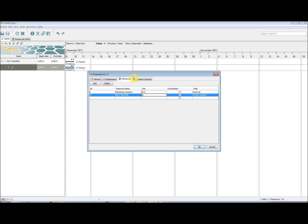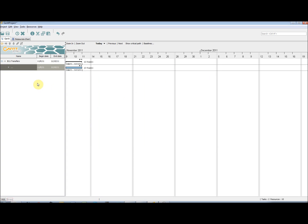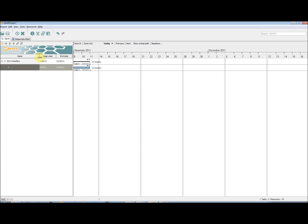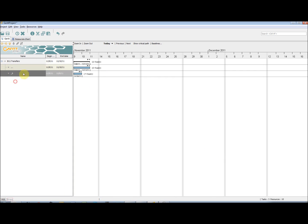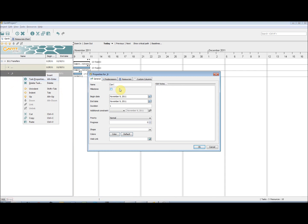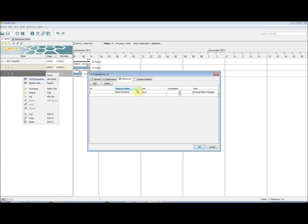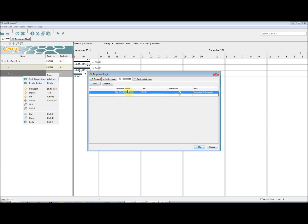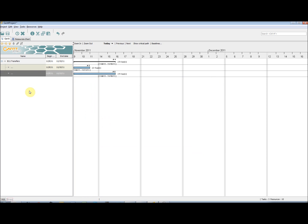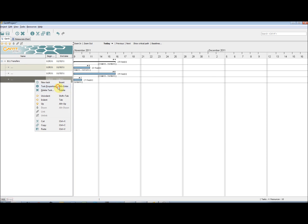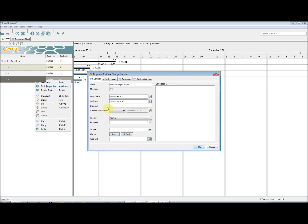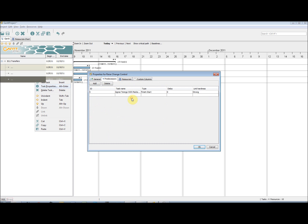I ensure that all the properties of the tasks are correct. However, this is not essential as you can go back and edit them at any time. I also add in the Resource Allocation for the task. Choosing the coordinator, and if there are multiple resources, sharing the load between them by changing the Units column.